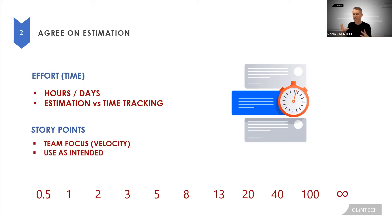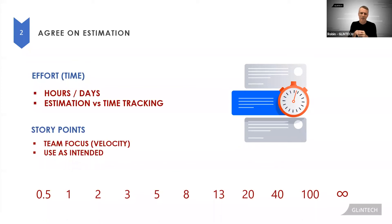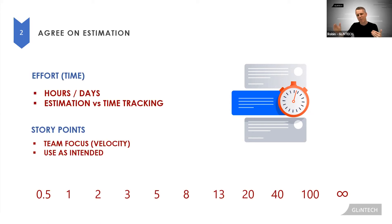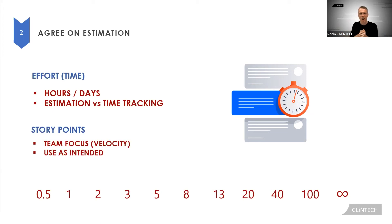All you do is decide are you doing time estimation or points? Now, I would encourage you if you're agile and you're doing scrum, use points. They are much easier. They're nice and ambiguous. They average out better, I find, over a longer time. The value of them being we can assign them quickly and they don't have the emotional weight of saying how many hours something will take.